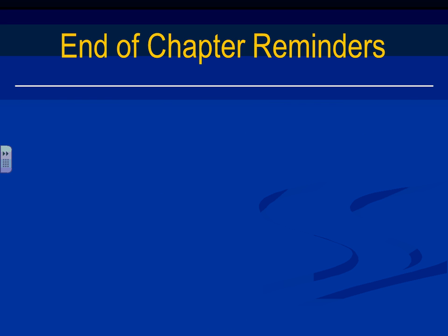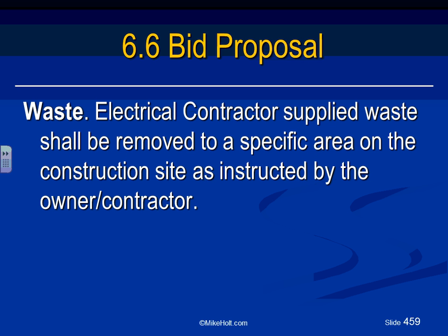So that's basically it in terms of the bid proposal. Any comments, guys? Any questions? To summarize, my friends, for those of you who are going to be a project manager, after you do the break-even cost, you're going to spice it up with, say, 5 to 10% for profit, and then you're going to add it up. Then that will be your so-called selling price.